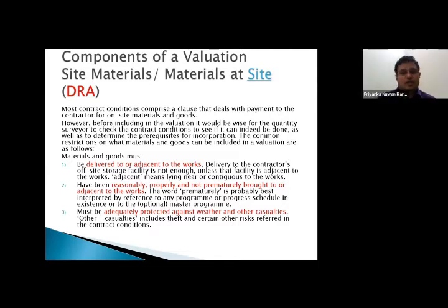Okay, fine. So what I'm going to say here is, now the FIDIC 1977 version, the word site has been defined as the places in or under or through where the works are to be executed. But it is a non-exhaustive list of prepositions which has been used in defining the word site.